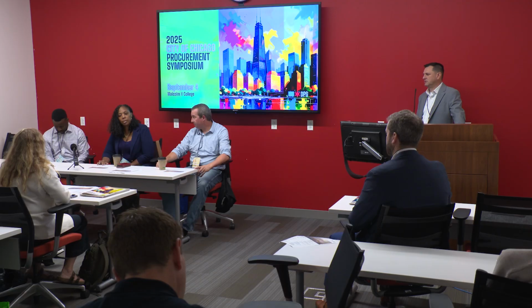Would the city ever say, you know what, I don't like the way you've broken them out and I want you to do something different? Yeah, we review them all before they hit the street. If something didn't work well on T5, because it was one of the first ones, we've changed it on other projects. So it's all case by case, and we review everything before they hit the street. I would also say that sometimes it's dependent on the availability of the contractors within the market and what other projects they have working on, and their capacity to fulfill a $200 million job or a $50 million job. I think all of that plays into consideration.